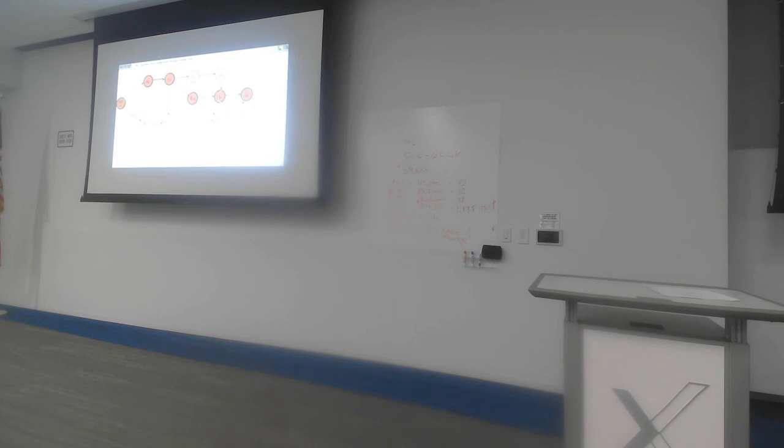Now that I've changed one of these numbers, the actual duration of one of these activities, you can imagine the effect that that would have had on my critical path analysis if I were to do it again. Rather than do the critical path analysis every single time I change one of the numbers, which would be really laborious, I'm going to take a shortcut. I'm just going to keep an eye on what's happening to each of the different paths that are on my project network diagram to see the effect that changing the duration of I will have.